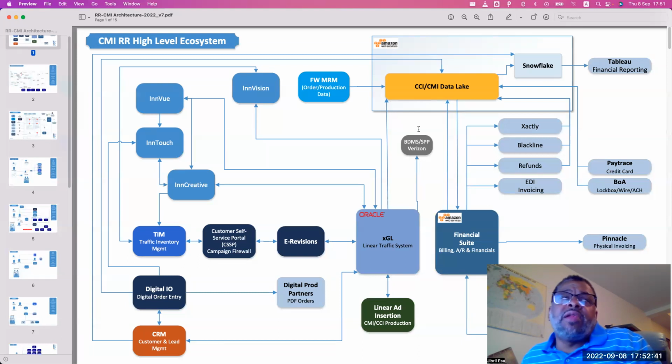So what we've done probably in the last 3-4 releases in regards to all of the other project work and in regards to DIO, at the end of a sprint, we do a deployment. And so if there's any change that happened in DIO within the last sprint, we're ready to deploy it. The only thing that holds us up is our internal team saying, hey, I've made the announcement out to users, and if it's a new feature, that they've arranged for the training of that.